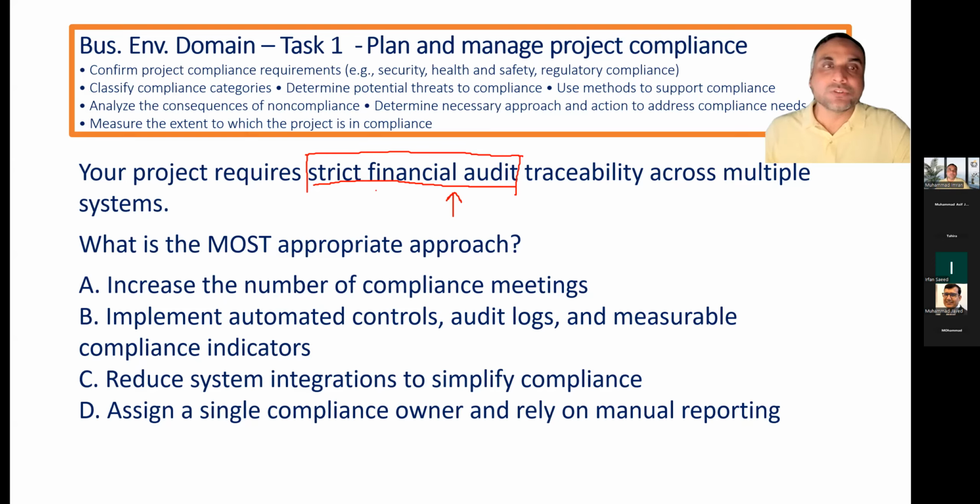Exactly. Cost reimbursable contracts, where buyer is at risk, seller is safe. To ensure that cost is being spent in the right direction, we need to have a strong financial audit. Thank you.